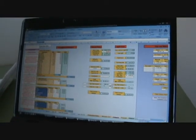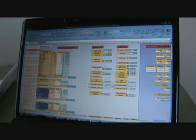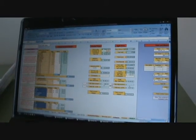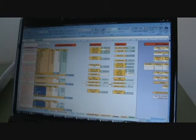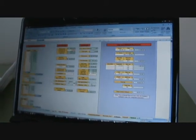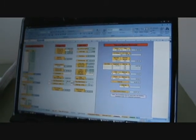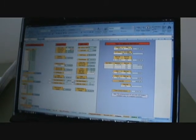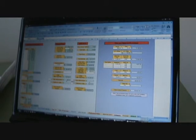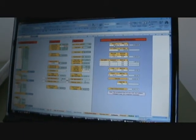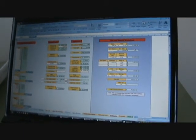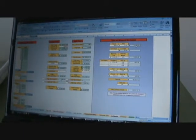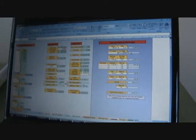So there's a labor burden way to figure. So you got three different ways to figure a quote. Here's a third way, just straight hours. If your labor rate is $35 an hour, you figure 900 hours based on your other two ways you figured it.